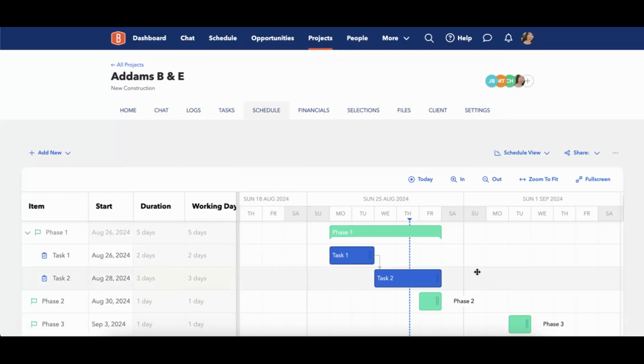And again, what you'll notice is that the phase has now elongated. Additionally, there's a dependency. This little arrow marking essentially says that there's a dependency between these two items right here. Again, even though I put in that negative lag time, this doesn't move the task, and it's not designed to. The auto schedule rules here are that task 1 has to end before task 2 can begin.